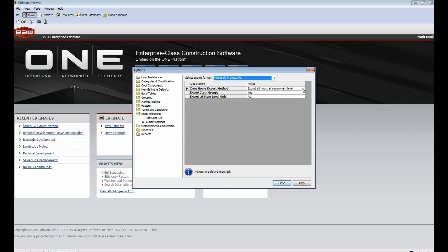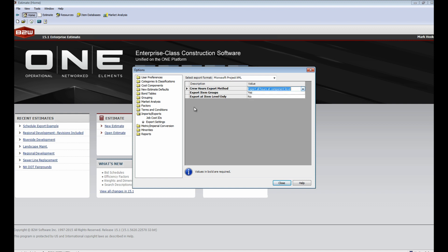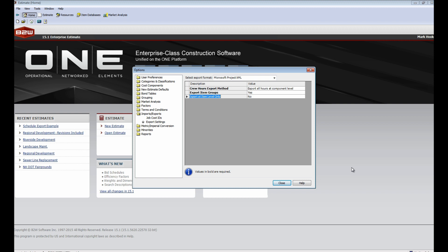Here you can determine how labor and equipment hours are sent, how groupings of items are displayed to separate out your pay items from your indirect items, as well as determining what level of detail you want in the project, item level only, or have B2W Estimate separate out task level information, giving you multiple options in creating your project schedule.